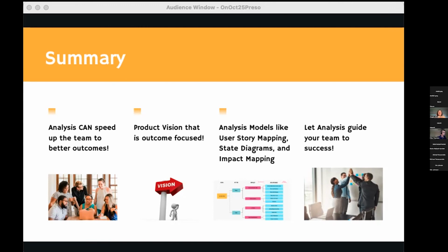A lot of the defects look different, but they're actually for the same thing. So we have to be analyzing those things. And for technical stories, we have to be really looking at, is there user value changing in that, or is it technical debt? So I'm not a huge fan of a concept of defect stories or technical stories. I think it can sometimes be an excuse to not write a good user story, or for teams that don't know how to write a good user story or don't know the user impact of those technical or defects.